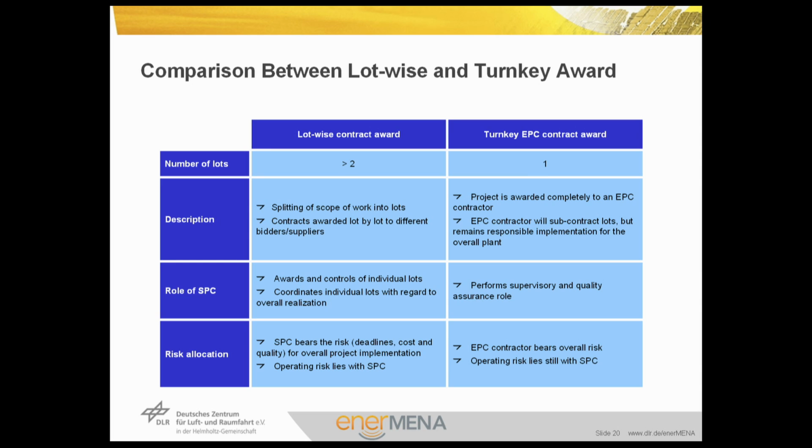And also the operating risk lies with the SPC. This is a very critical point. In the IPP case, the operator is involved from the early stages as the EPC contractor defines its technologies, its sequences, familiarity with the equipment to be ordered. So it is important in the IPP principle that the operator interferes in the early stages of the development to bring its experience.